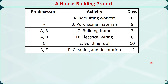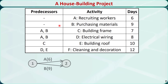With these rules in mind, let's see how to create a project network using available information. This is a house building project involving six activities. Activity A is recruiting workers — it takes 6 days. Activity B is purchasing construction materials — it takes 9 days. These two activities have no predecessors, so they should be connected with starting node 1. After A and B are completed, we can start activities C and D: building the house frame and installing electric wires, with durations of 7 days and 8 days respectively.